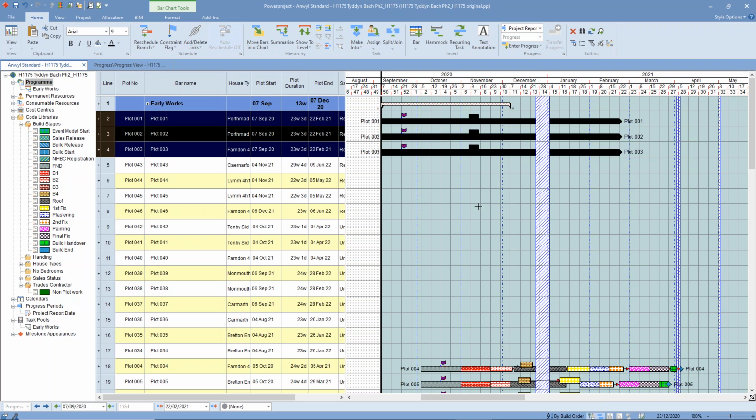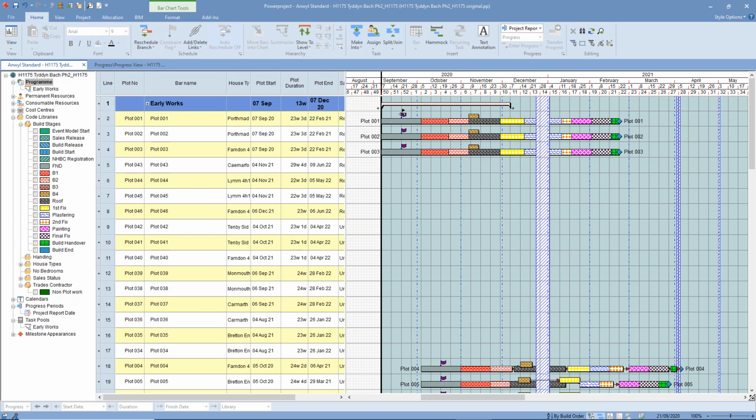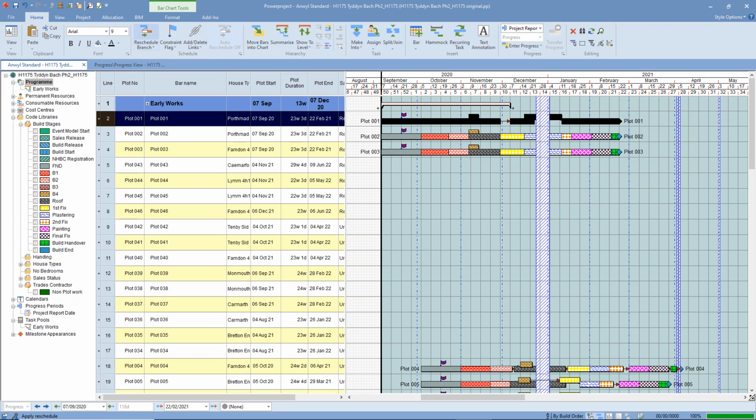And I get a warning down the screen because this flag date is earlier than the last task that it's associated with. And so I wouldn't do this because I can sort it out later, but it needs to be in the future. And then it's a sort of nice blue color, and this has got a sort of red stripe through it warning you that you've exceeded that date. So we use that to represent the forecast legal completion date, but we'll come back to that. And that's all very well, but if you want gaps in here, then you've got to introduce those manually, and then if you reschedule again, then you are going to put them back.